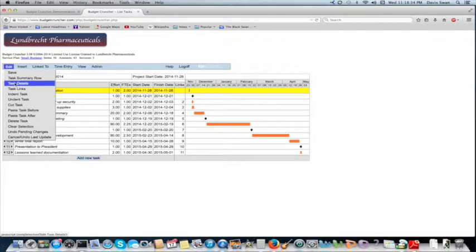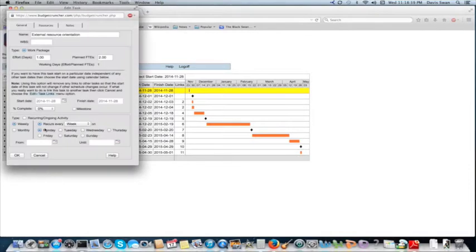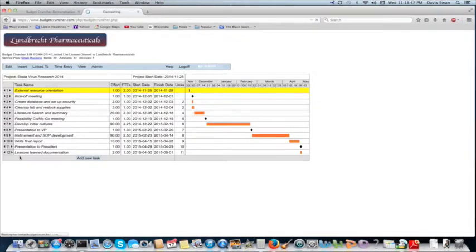We select Edit, Task Details, and set the percent complete to 100%. After saving this information, the timesheet indicator turns green, indicating that the task is going as planned. By hovering over the entry again, you get an updated message which provides more details.